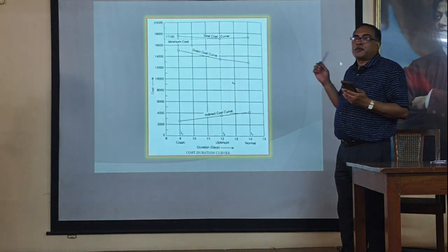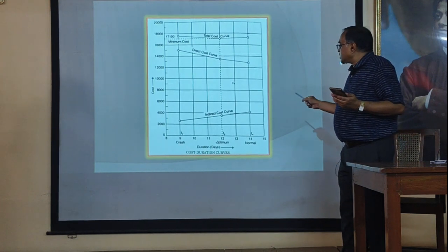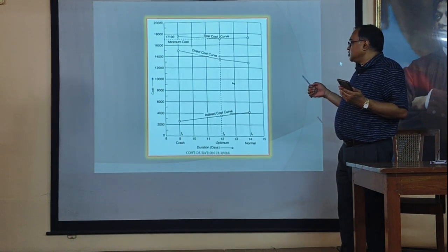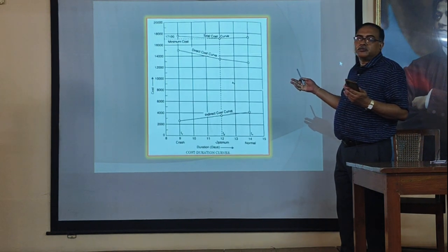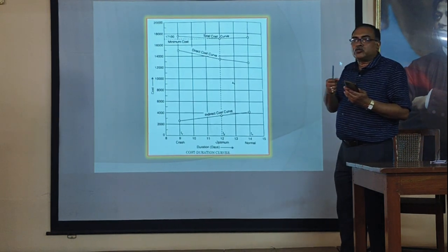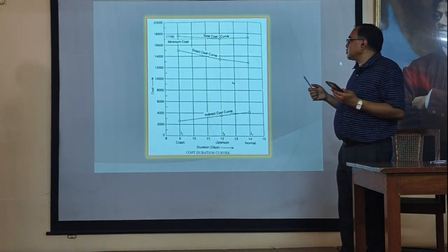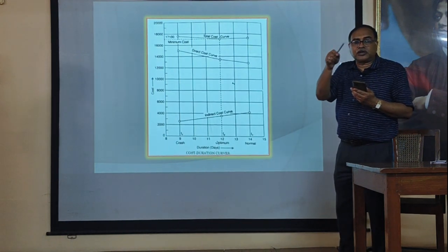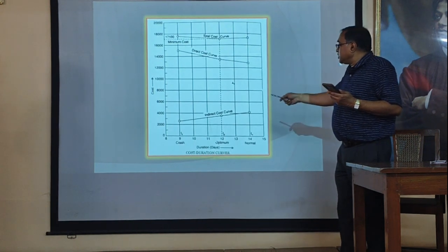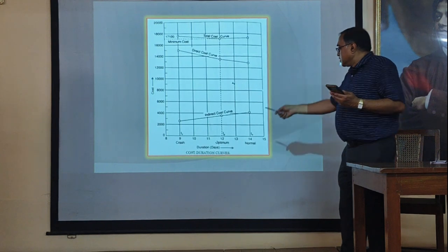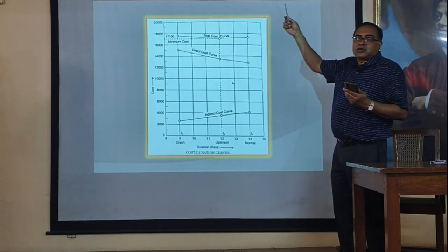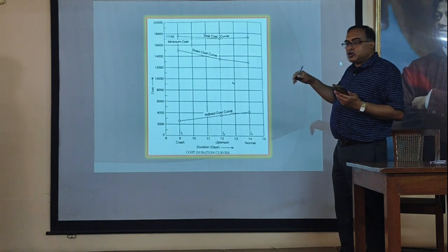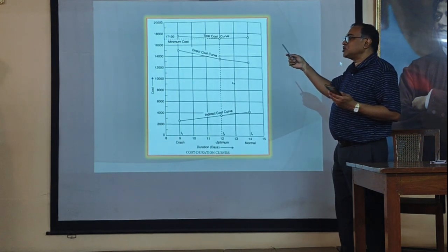Next, this is given in graphical form. The lower part is indirect cost at the rate of 300 per day. For 9 days and different days, it is given in our coordinates, and we have continued this curve. There are two line segments for the curve. Next is our direct cost relationship. And this is our total, indirect plus direct, so it is our total cost curve. X-axis is our duration, and Y-axis is our cost. And the minimum cost of the total project as per optimization using this network technique is 17,100.